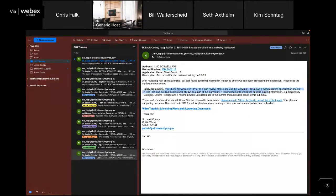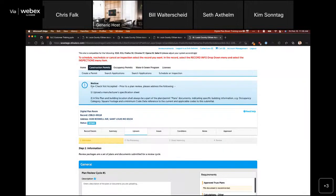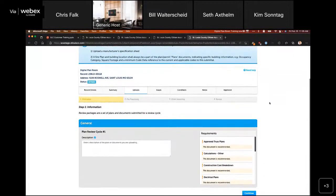The comments will be displayed right here in this email, as well as when I click this link, those comments are also going to be displayed at the top of my review package. So I can review those comments. And now my review package is actually moved into a status of reopened, which means it's now open again for me to make whatever changes have been communicated to me from staff.